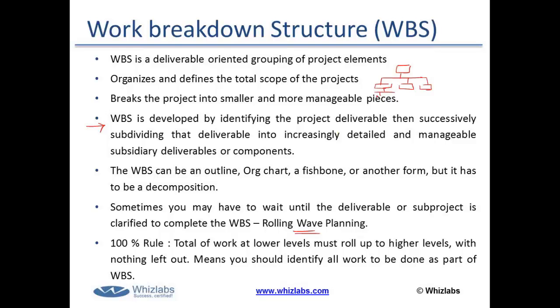We are saying that you would do the planning in stages. Makes sense? Let's say you cannot complete the interior and exterior decoration work package till the time you have not come up with a design of the building. Before the design is created, it's very difficult for you to actually plan what all is required for the decoration work, right? So you define the WBS only up to the design phase, and then once that design document is ready, based on that, you come up with the rest of the WBS, that is the decoration work or the electrical work, plumbing work, etc.